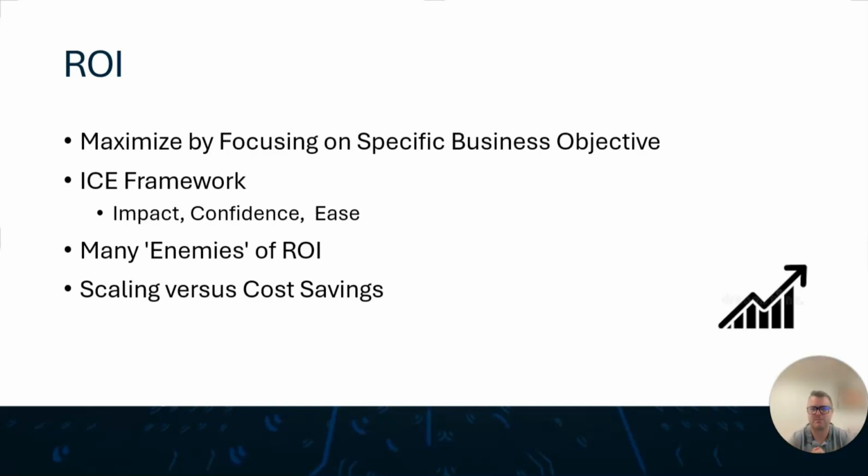So avoid having bad data or not cleaning up some of that data. Scope creep is another big one. I often highlight that because scope creep can happen on both ends of the spectrum, whether the project is going well or going poorly. With poorly run projects, we're wasting time and resources chasing perhaps the wrong things. When things are going really well and you're seeing a lot of success, we tend to see people trying to add to the scope. So on both ends of the spectrum, we can see costs escalate.